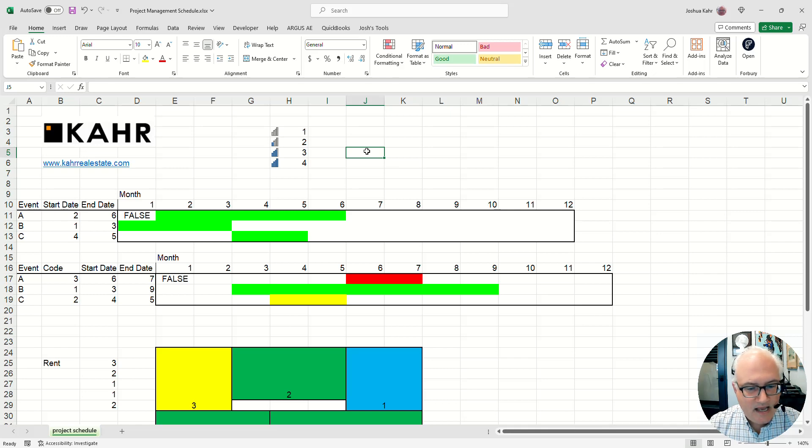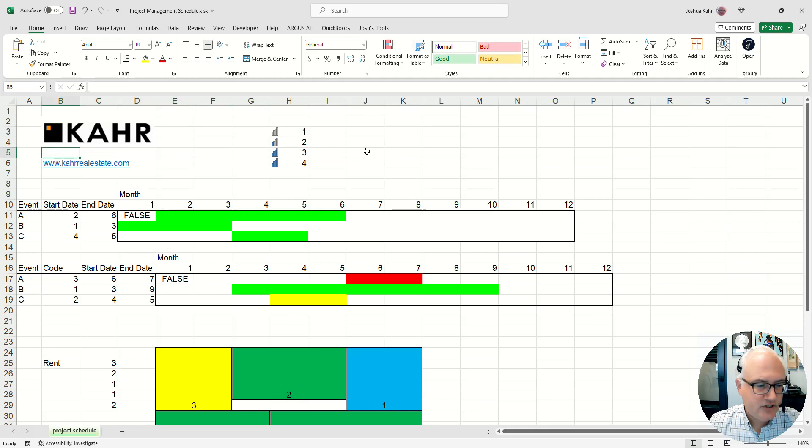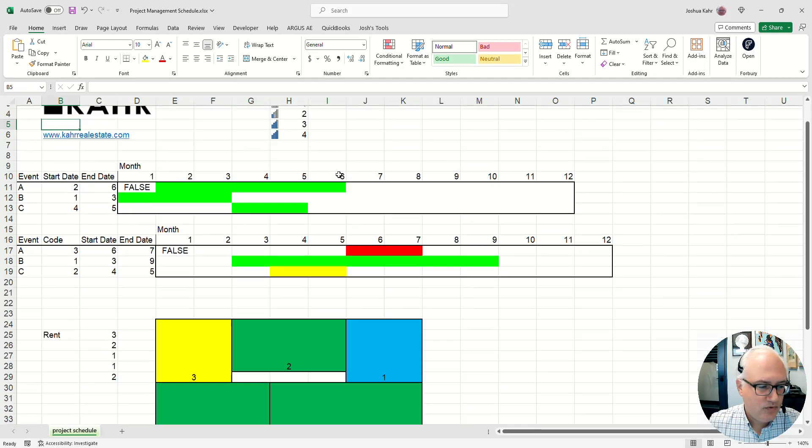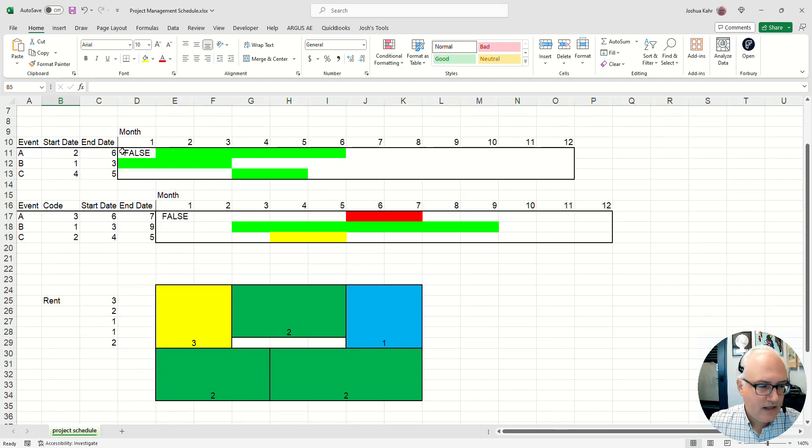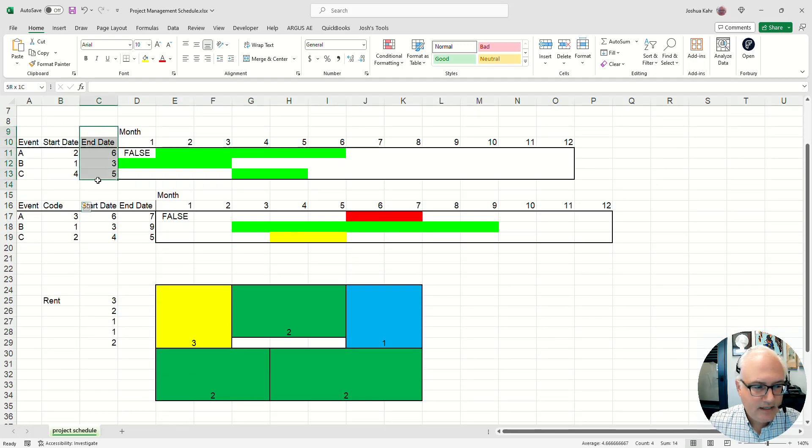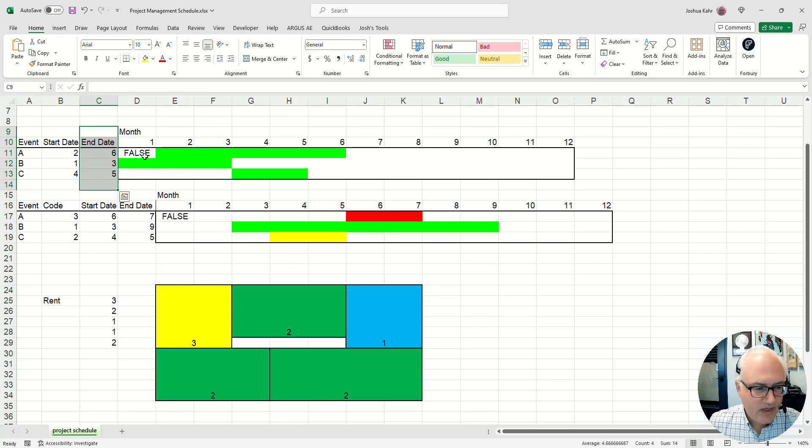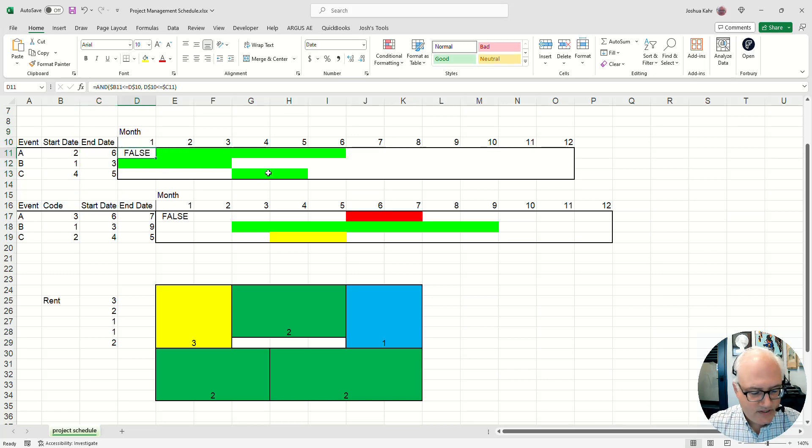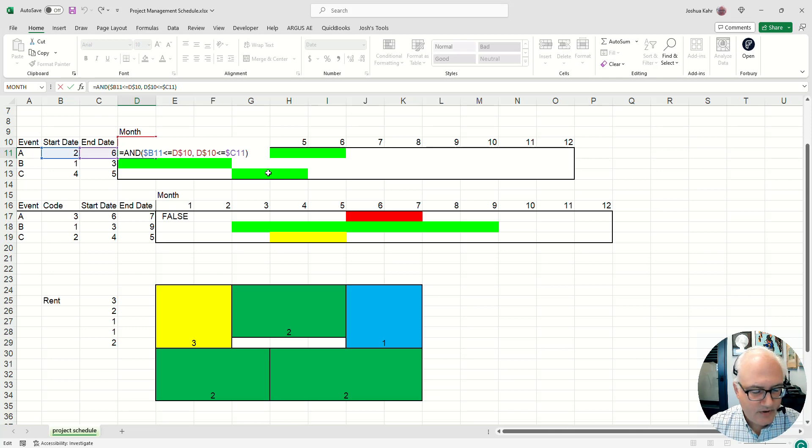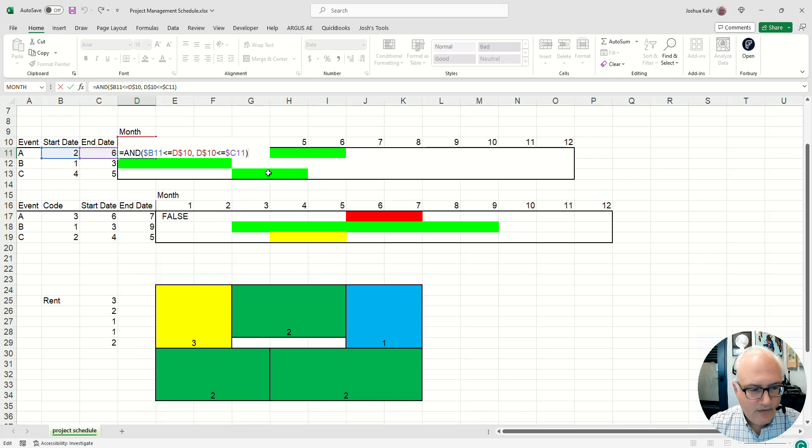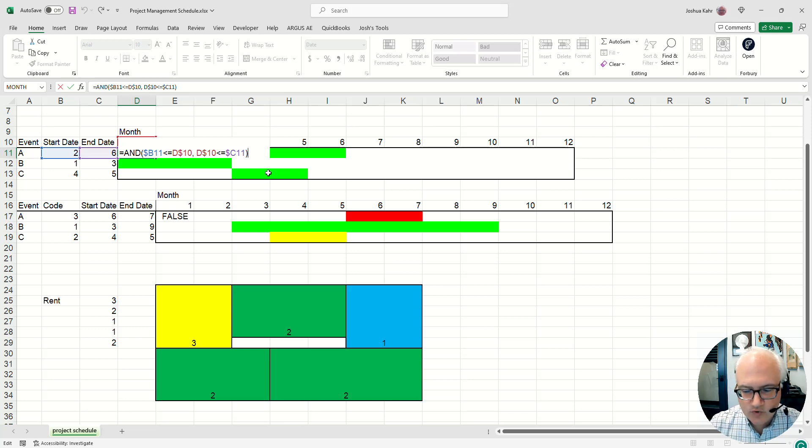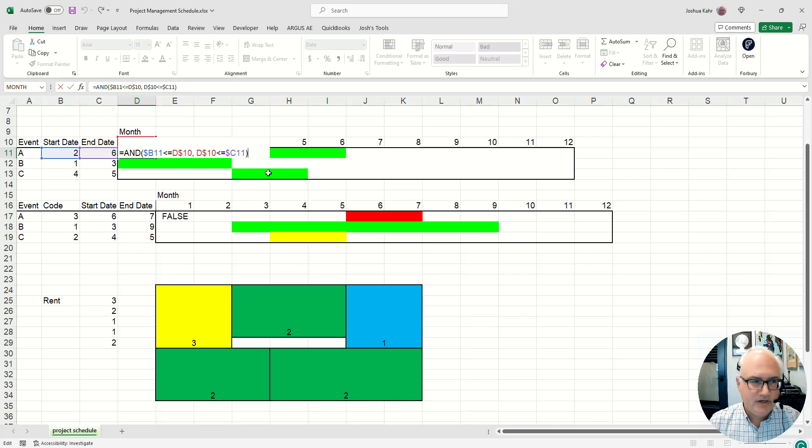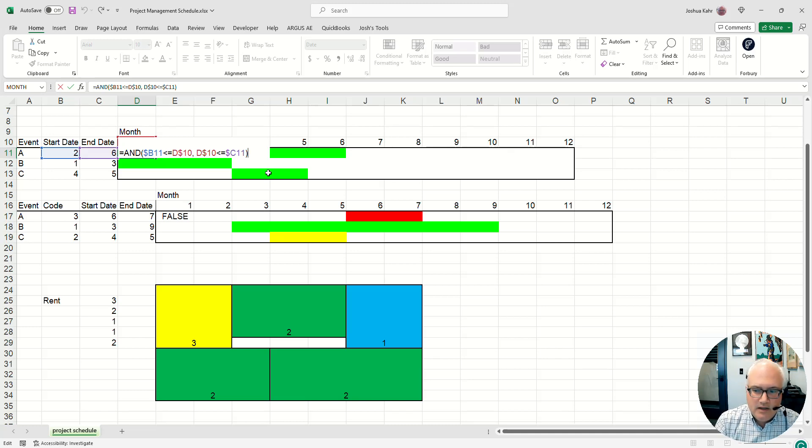This is how I like to use it. Let's say you have a project management schedule, and you've got start dates and end dates or something like that. In each of these cells, I have a formula. In this case, it's comparing the start date to the month we're in and the end date to the month we're in, and of course, if both things are true, this evaluates as true because that's the way Excel works.